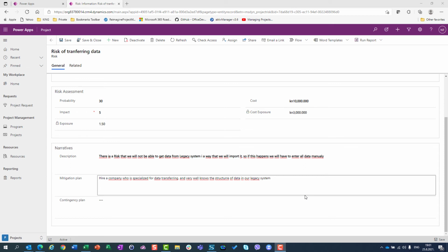And maybe the insurance company will tell you, okay, if you want to insure things in your garage, you should pay $1,000 per year. But all the stuff which you have in your garage is worth, let's say, $300. Are you going to spend $1,000 for insurance for things worth $300? No, you are going to accept it. If it happens, it happens. If someone's going to steal those things, I accept it.